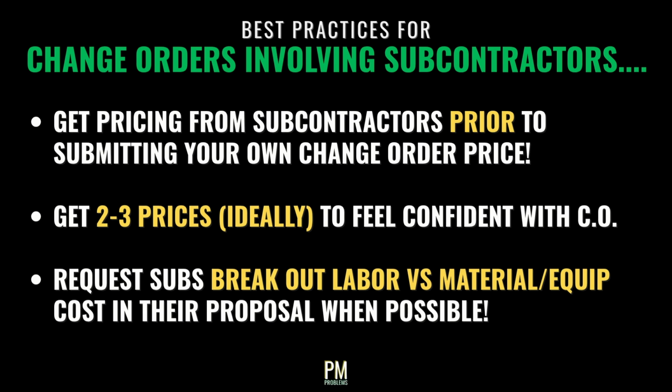It's of course essential that any potential subcontractor is charging the proper amount for their own labor, equipment, and materials as well. This is why it's best to have subcontractors break out labor versus material costs in their proposal at minimum.